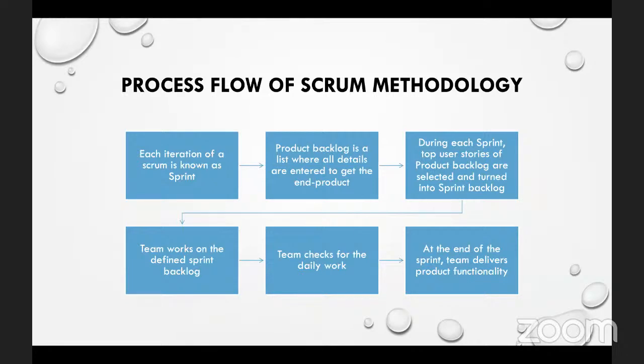But these stories that we're going to work on in that sprint for those 2 weeks, or maybe 4 weeks iteration, this is what we call a sprint backlog, right? Very simple. So you should know the difference between a product backlog and a sprint backlog. The sprint backlog, the 2 weeks iteration, the feature set of stories that we're working on, is what constitutes the sprint backlog. And the product backlog is the entire wish list, the entire user stories or feature sets of the end product.